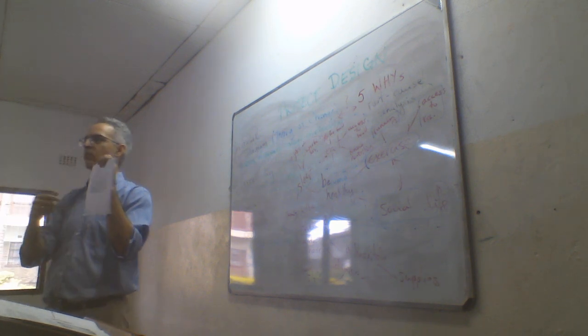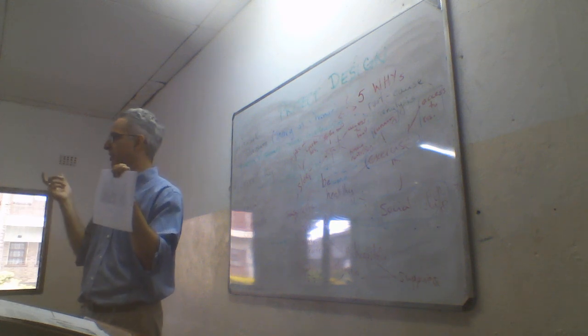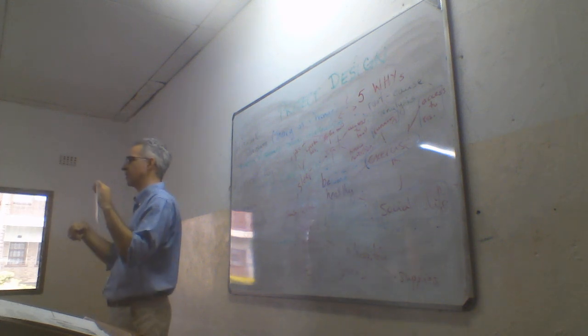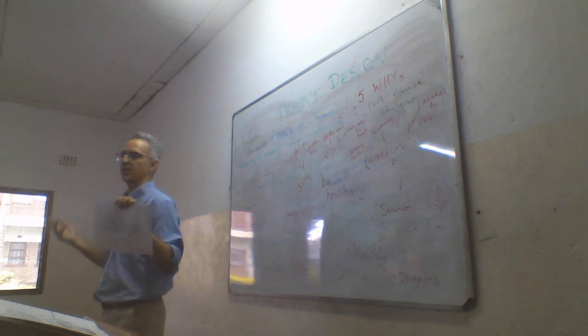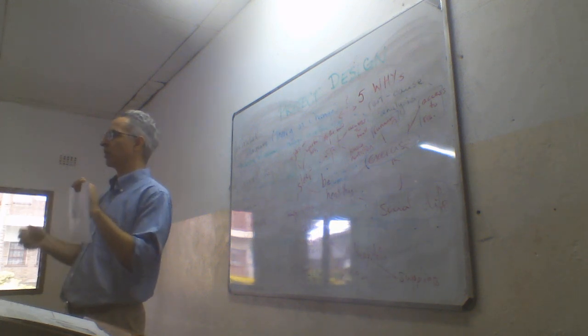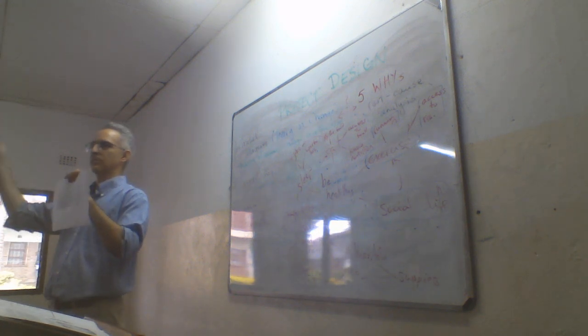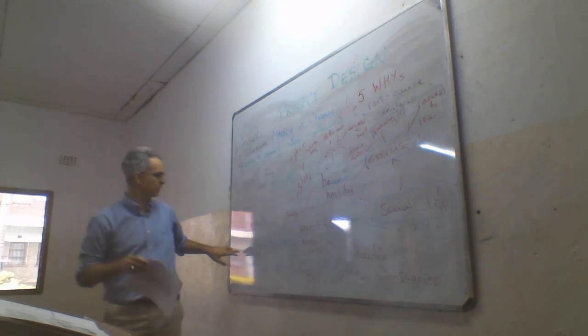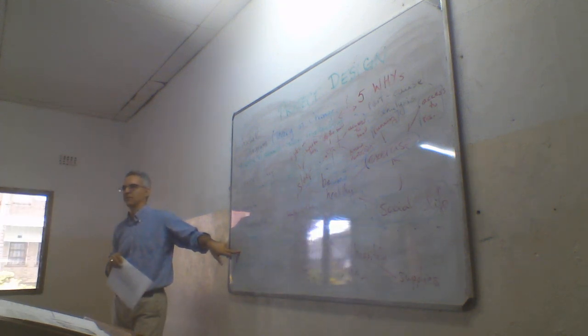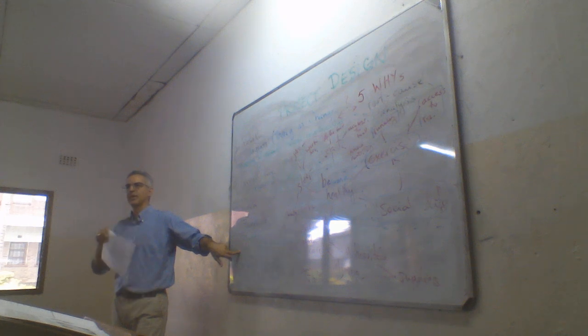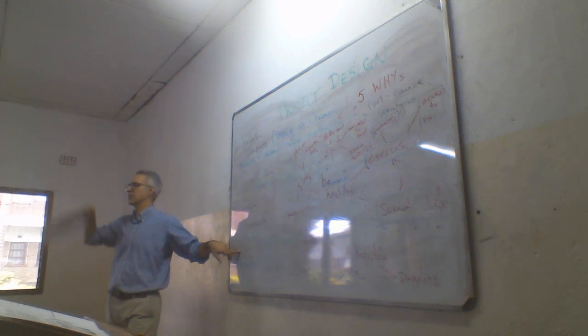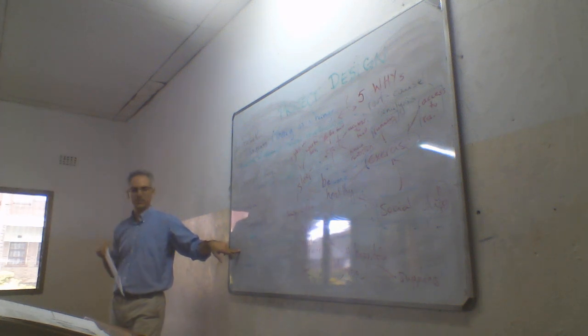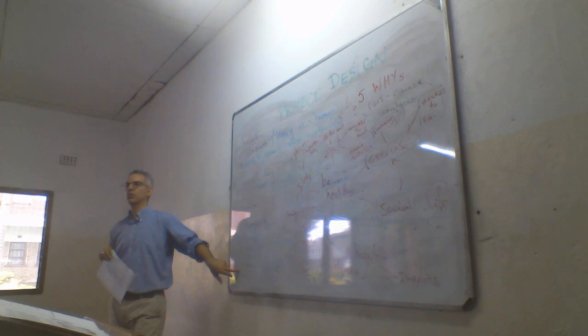For the literacy, our goal is to increase literacy. So we're going to measure literacy today. It's today 20%. At the end of the project, we want it to be 50%. Okay, that's the expected level of achievement. We expect the result to be 50%. And what effort will that take?